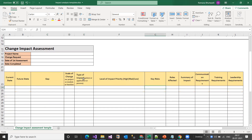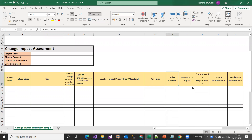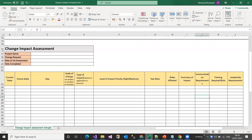There are many columns: current state, future state, gap, scale of change (whether project or modular function), type of impact (system level, application level, process level, or deployment level), level of impact priority (high, medium, low), key risks, roles affected, summary of impact, communication requirements, training requirements, and leadership requirements. All this information should be filled in before you start working on a bug or change request.